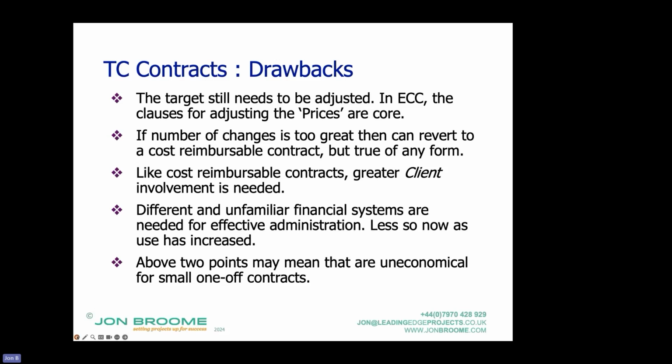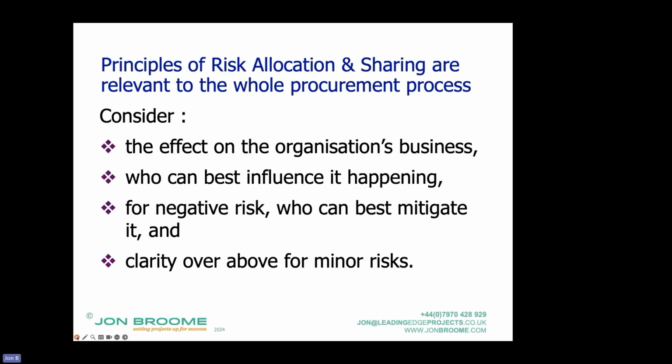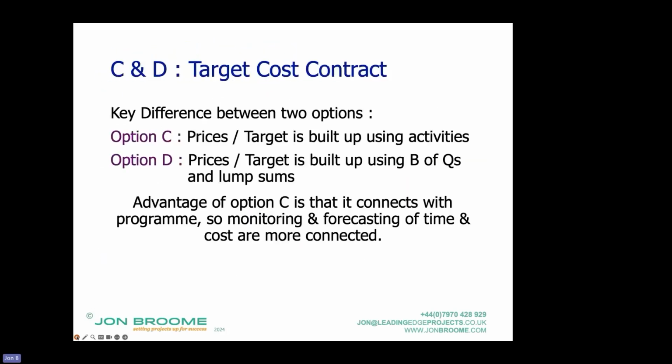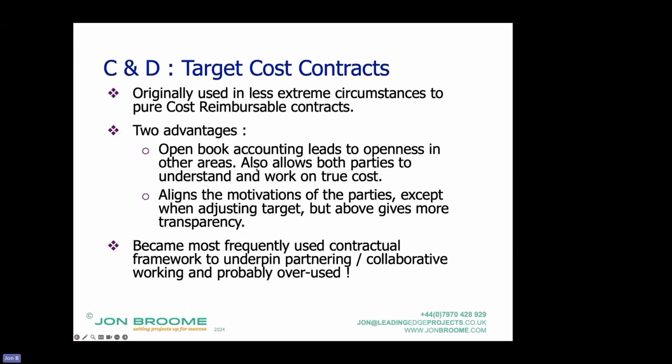Going back to my professor's research here, when he found it was being used, he also found that where it was used was in less extreme circumstances than cost reimbursable contracts, where you could say it's about that much. And depending on whether you were going it's about that much or that much would affect how much pain/gain you allocate.